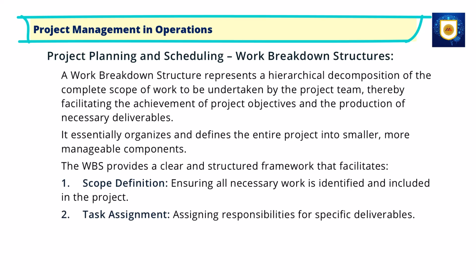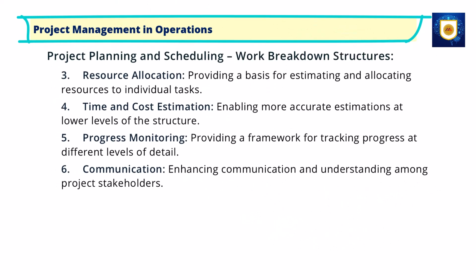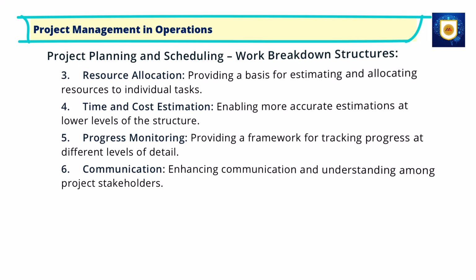2. Task assignment, assigning responsibilities for specific deliverables. 3. Resource allocation, providing a basis for estimating and allocating resources to individual tasks. 4. Time and cost estimation, enabling more accurate estimations at lower levels of the structure. 5. Progress monitoring, providing a framework for tracking progress at different levels of detail. 6. Communication, enhancing communication and understanding among project stakeholders.